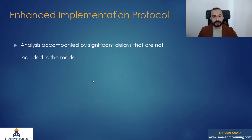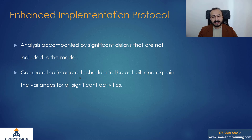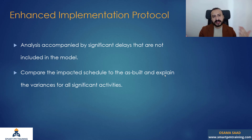In the enhanced implementation protocol you can perform an analysis for all significant delays that were not part of your analysis — maybe they did not hit the longest path, for example. So for enhanced implementation you can perform an analysis for all other significant delays you did not consider before. Compare the impacted schedule to the as-built and explain the variances for all significant activities, because your schedule update includes all actuals in the project — you want to compare that to your impacted schedule after adding the fragment. This is for enhanced implementation.